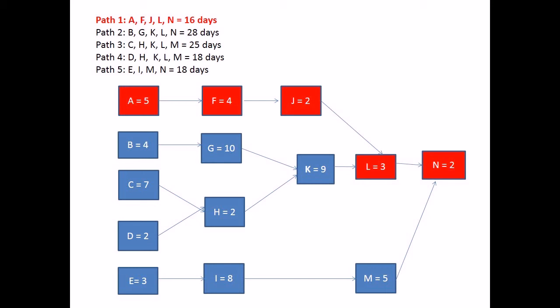Path 1, highlighted here in red, has a total duration of 16 days. Add up the duration of each activity to determine the total duration for the path. For example, 5 plus 4 plus 2 plus 3 plus 2 equals 16. Follow the arrows to understand the relationship between the activities.